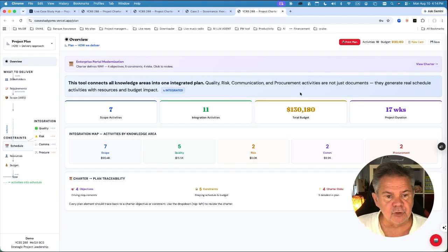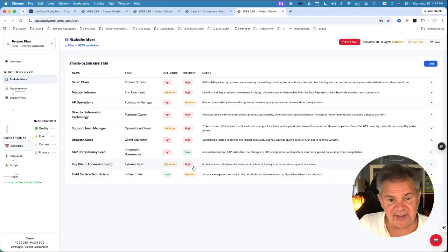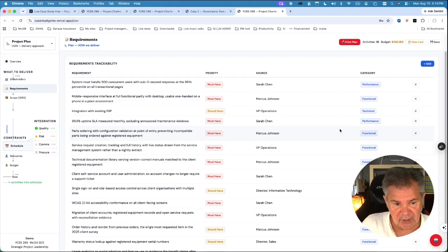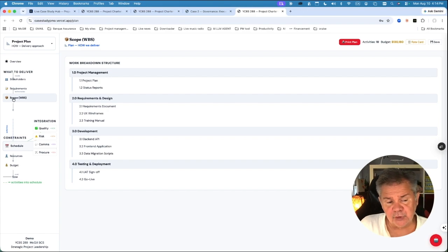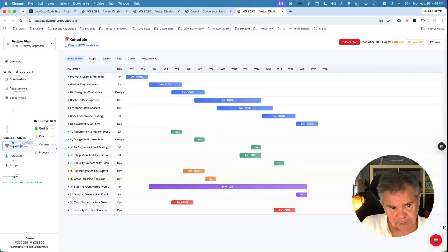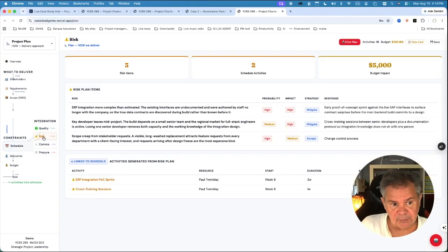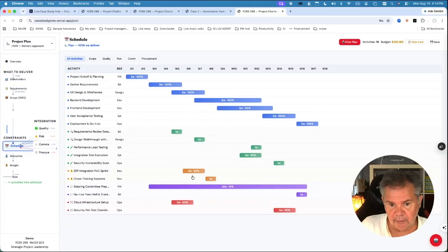You got an overview, as kind of a dashboard of his project plan. The stakeholders that he had identified and their needs, or if you want their requirements, transfer here. So their needs are transferred into a requirement. The scope that goes with it. And then from the scope, you start working the schedule. Connected to that schedule is his quality plan in green. So in the schedule, the green part is his quality plan. He's got the risk, okay, here. And the risk is there in orange.